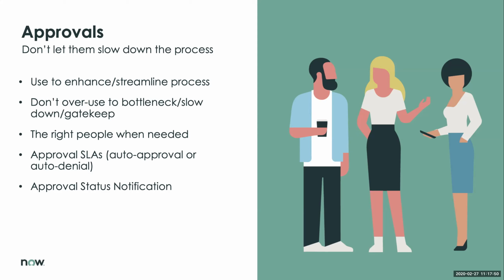You can define different approvals for different types of work. And this is something where you may not have any approvals for smaller work items, defects and changes. Some of those you might just say, we have a pre-configured process for those. We know how to manage them, and we essentially can automate them. It just has to hit certain thresholds, and we consider that auto-approved. For other things like projects and product initiatives, we will need some approvals. We're going to need that review of business cases, of financial estimates, of resource plans to say, yes, we can take this work on, we'll move it forward.